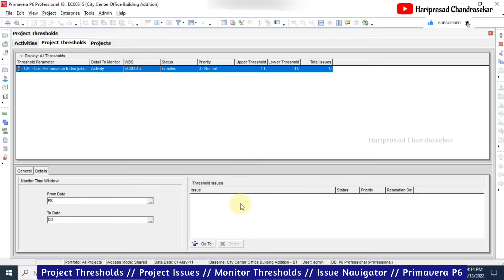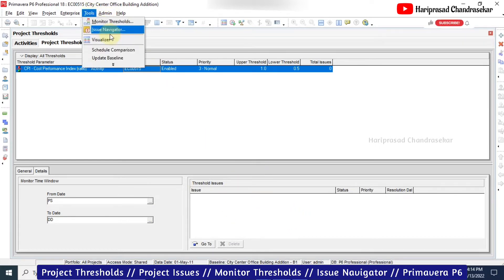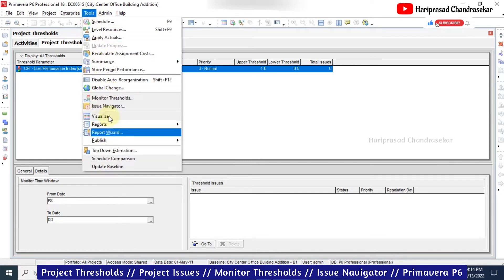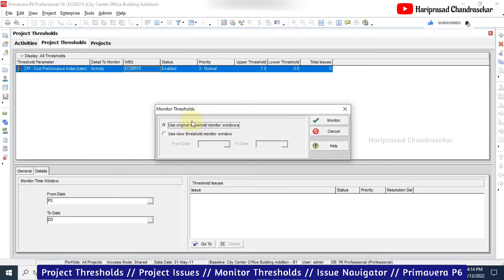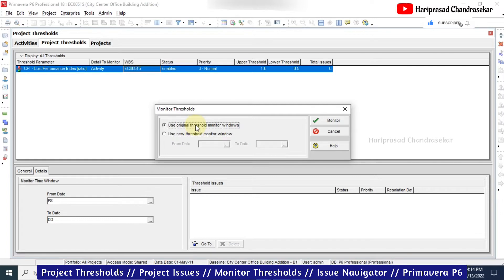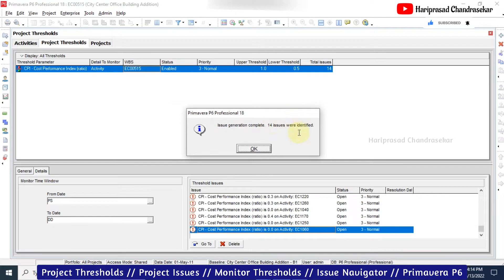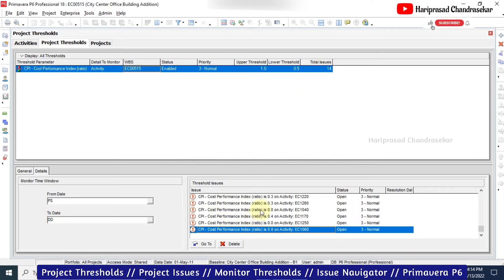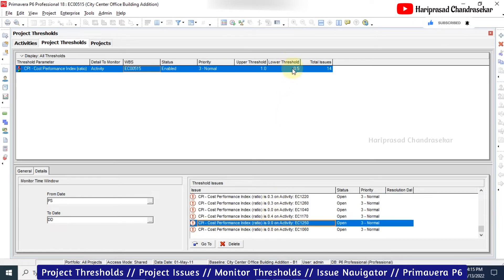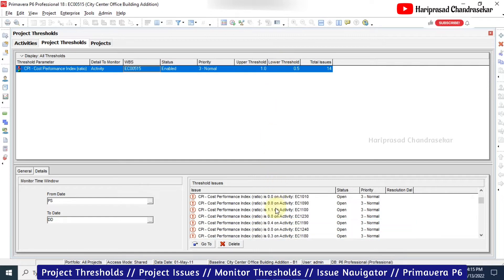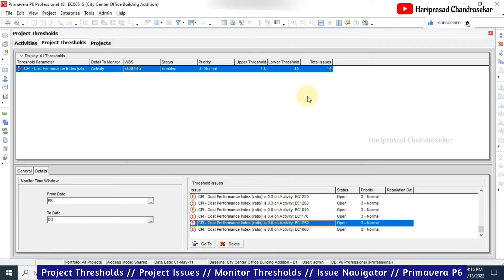To generate issues, go to Tools and then Monitor Threshold. It will ask whether to use the original or new threshold monitor window. You can select a particular date and run it. 14 issues were identified - click OK and they are listed here. You can see values like 0.3, 0.4, and even 0, all less than the lower threshold of 0.5. The upper threshold of 1 also flags values above 1. Anything between 0.5 and 1 - like 0.6, 0.7, 0.8, 0.9 - will not be shown.